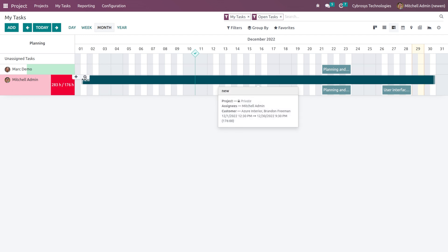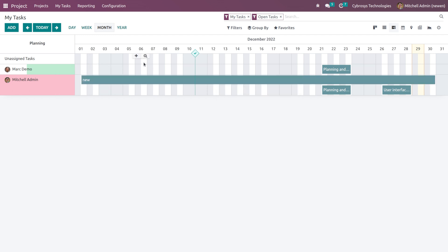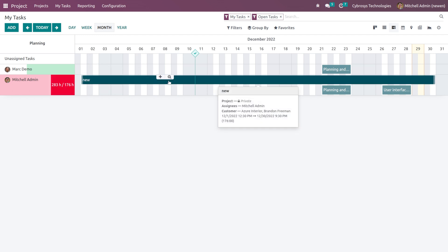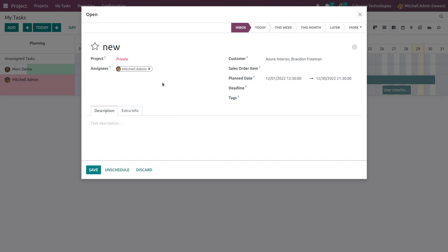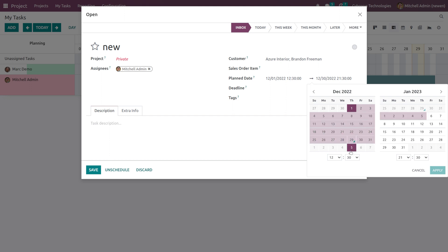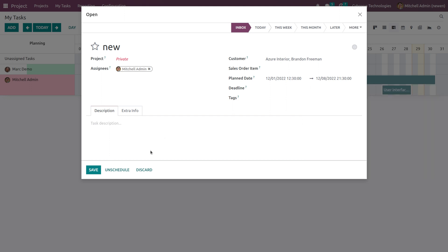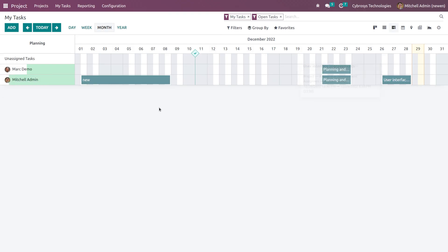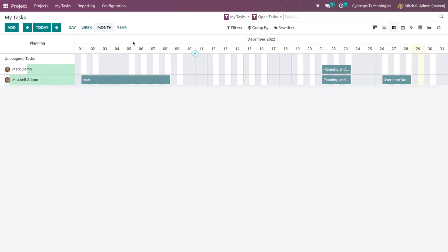So it is taking the scheduled date. If you want, you can just click on this and change the plan date. I'm just changing the date to the 8th and applying. See, here you can see that the length has reduced because it takes the date which we are giving. This is the starting date and the ending date.